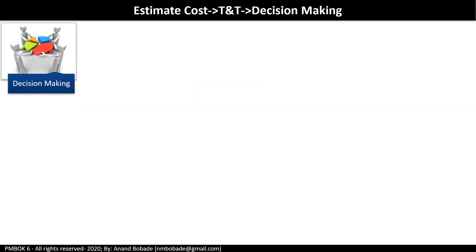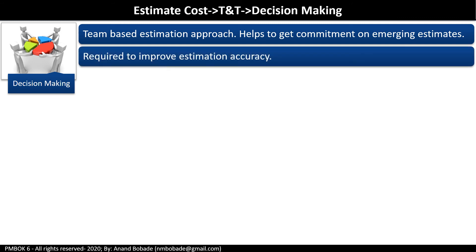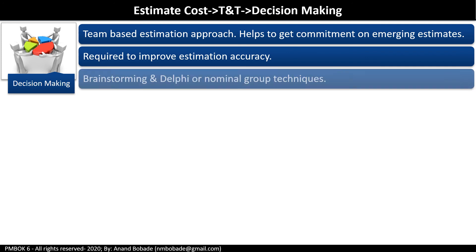Decision making: the estimation exercise is a good tool to get buy-in from resources. This is a team-based estimation approach that helps get commitment on emerging estimates and improve estimation accuracy. It may use brainstorming and Delphi or nominal group techniques to arrive at estimation-related decisions.